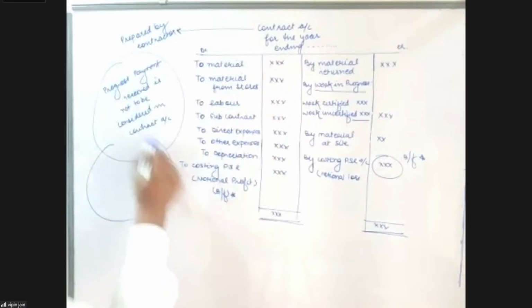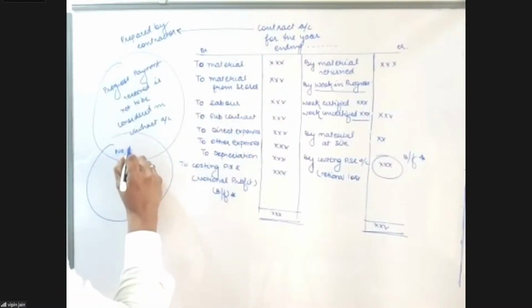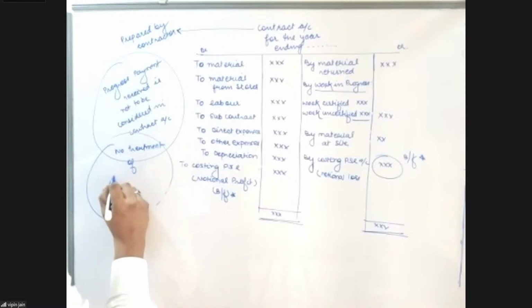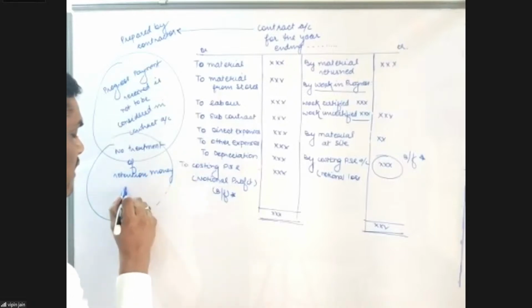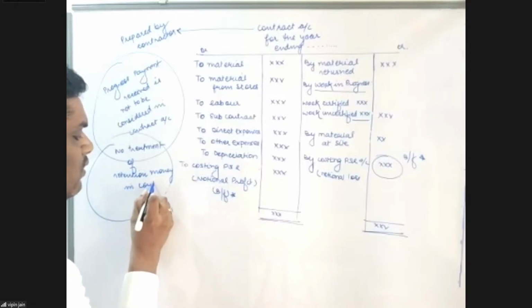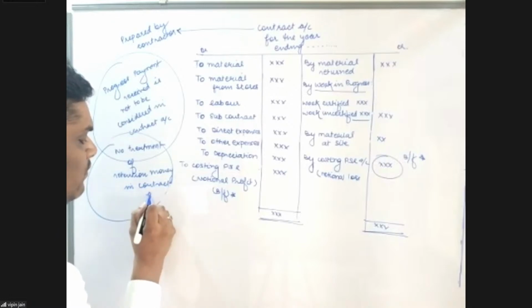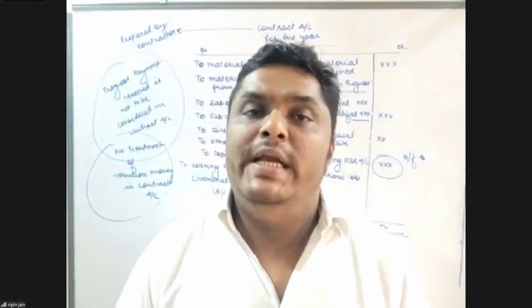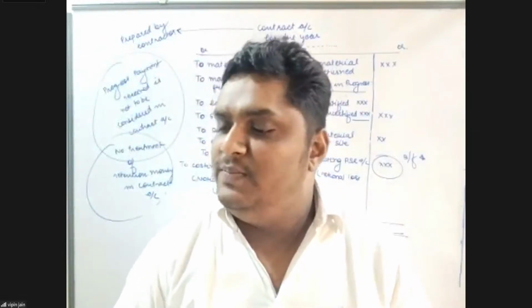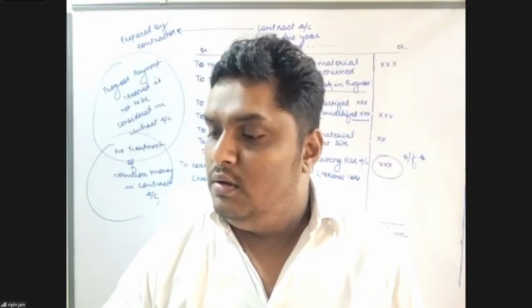One more point. No treatment of retention money in the contract account. No posting will be done of the retention money and progress payment in the contract account.